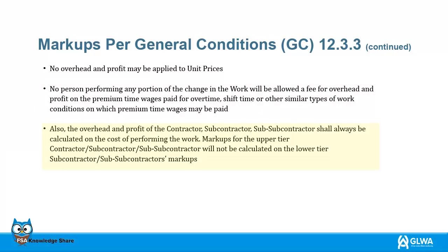Also, the overhead and profit of the contractor, subcontractor, sub-subcontractor shall always be calculated on the cost of performing the work. Markups for the upper tier contractor, subcontractor, sub-subcontractor will not be calculated on the lower tier subcontractor, sub-subcontractor's markups.